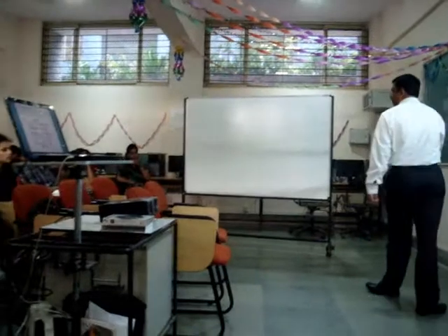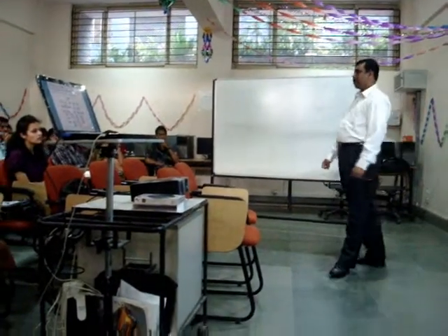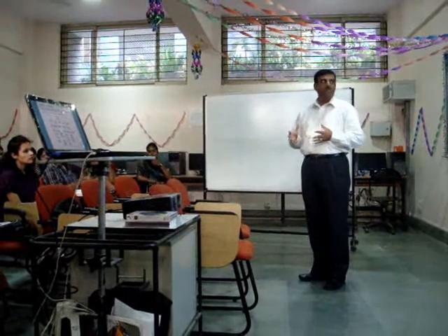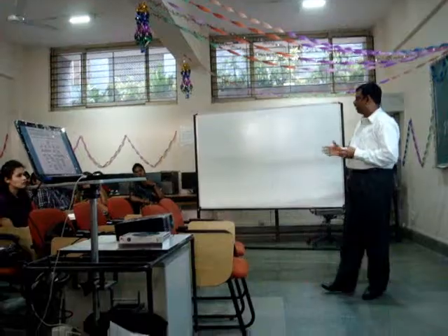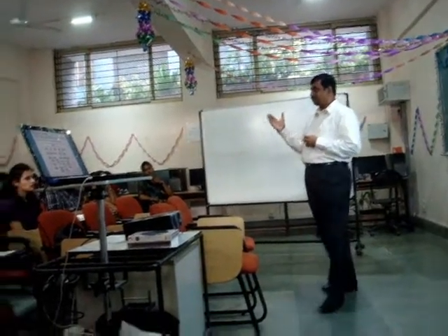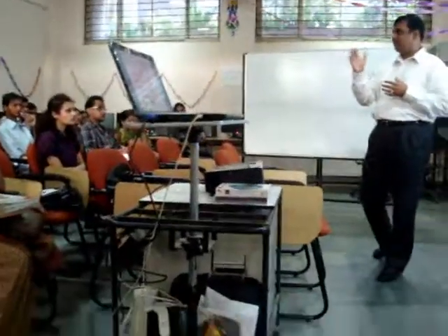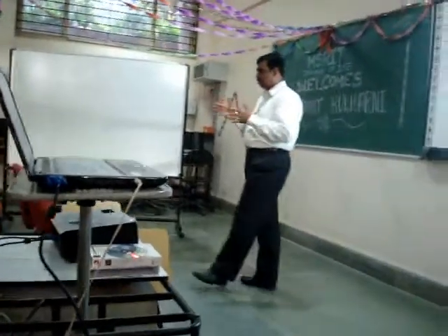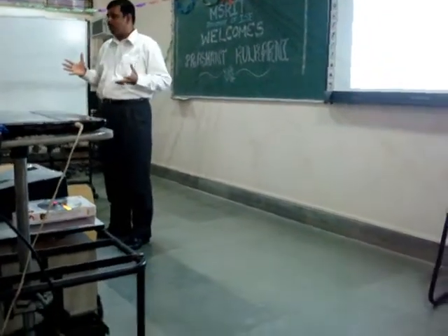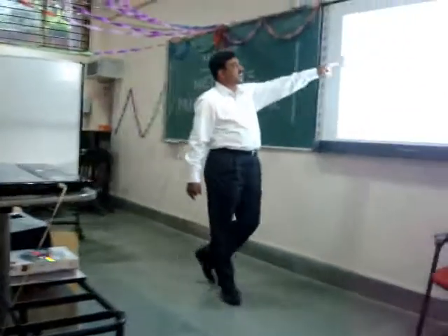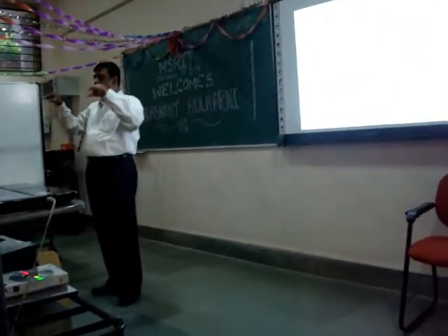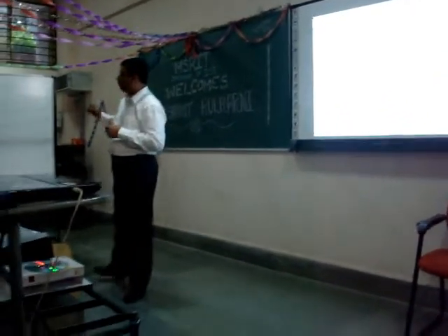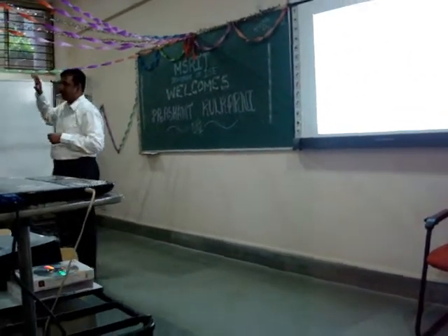The first one is called the work breakdown structure. Okay. This is the first thing that you do with your team when you get into the planning phase of the project. The second phase. You define what you want to do, you got the charter signed off, and now you are starting to plan your project. This is your project. It could be anything. Okay? That's on the top. The end objective that you want to achieve will be on the top of the hierarchy.